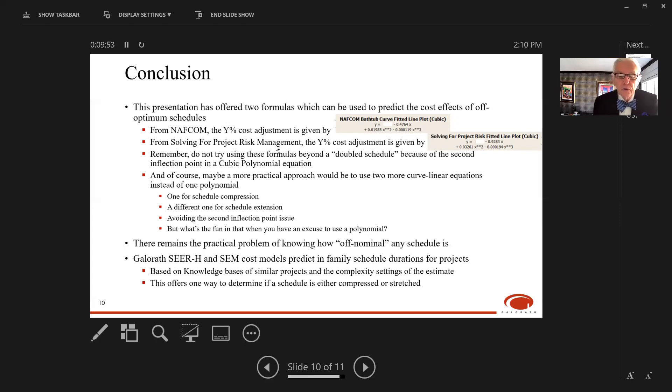There remains another practical problem—knowing how off-nominal any schedule may be. A solution is the Gallarath SEER-H and SEER-SIM models for hardware and software respectively. They not only estimate costs but also predict schedule, providing an in-family schedule duration for projects based on their knowledge bases. That's one way to know if your schedule is compressed or stretched, then use these polynomials to make a cost adjustment.